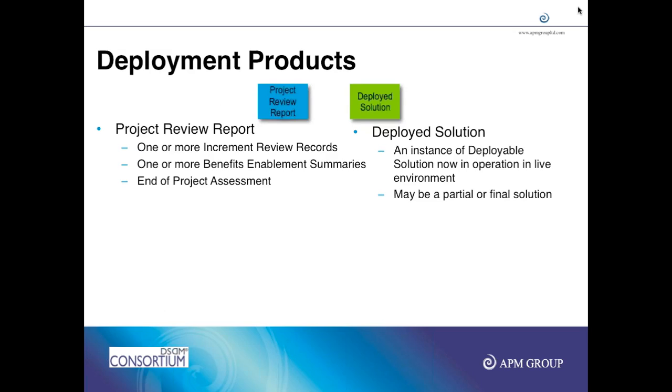But if you do not have priorities or requirements or understanding of the next release, you move to foundations to make a plan for the next release and to prioritize requirements, and then move to exploration or engineering. And the fourth exit could be that I can go back to exploration and start development. So you have multiple exit points once you have done the deployment.